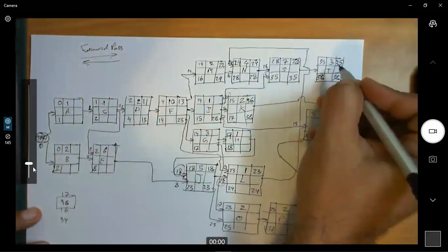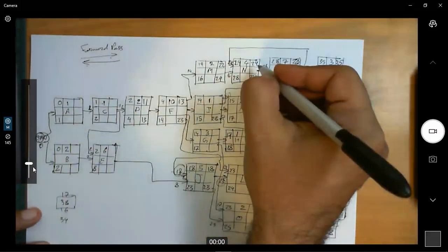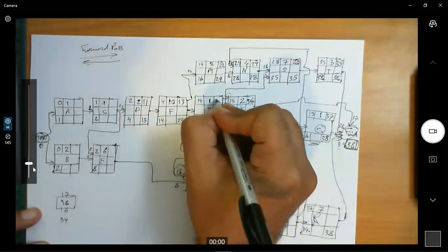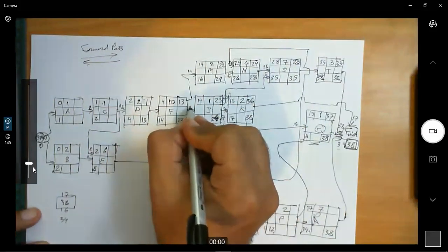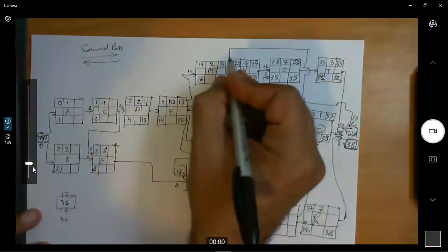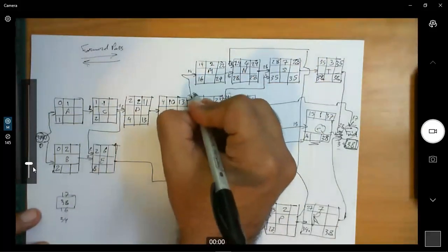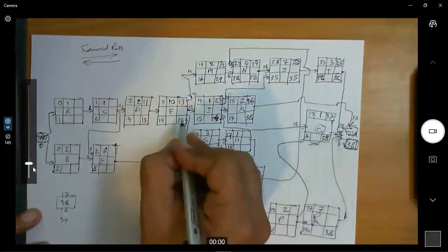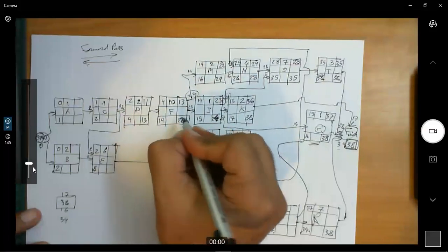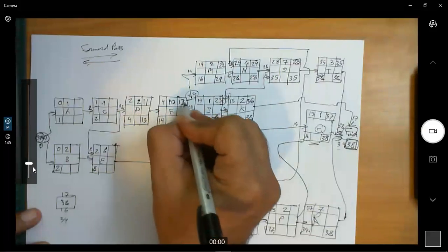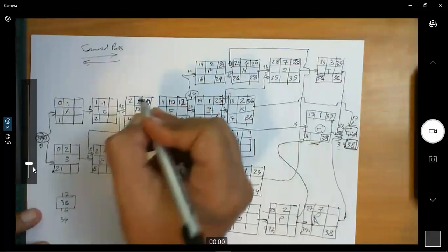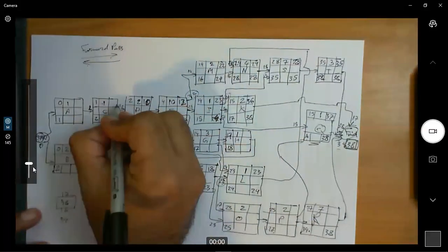That's 28 that came, 24, I'm sorry, came from here, 24. So 24 minus 1, that's 23. So this one feeds in here with 23. And here 22. And here 23. We take, of course, the lowest one, 22. Sorry. So here 22, that means this one is 12. So this one is 12, and this one is 10. So this one feeds back here into 10.